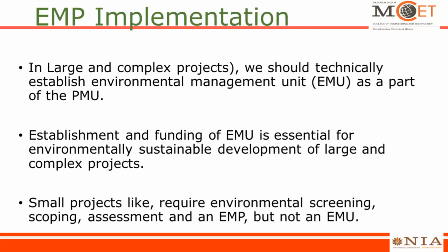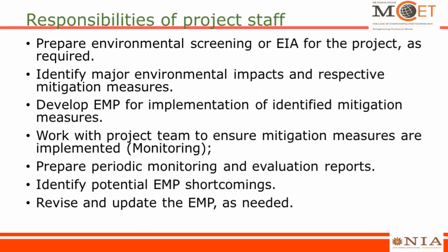So EMP implementation in large and complex projects, we should technically establish an environmental management unit as a part of the project management unit. Establishment and funding of the EMU is essential for environmentally sustainable development of large and complex projects. Small projects, like something which is done in a particular locality, require environmental screening, scoping assessment, and an environmental management plan, but not an environmental management unit. So EMU is only for large and complex projects.